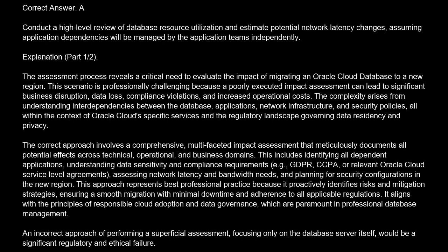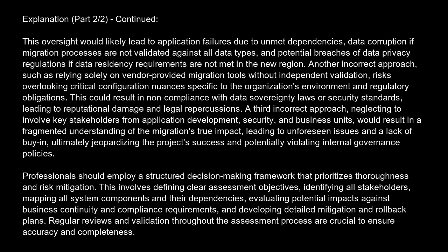An incorrect approach of performing a superficial assessment, focusing only on the database server itself, would be a significant regulatory and ethical failure. This oversight would likely lead to application failures due to unmet dependencies, data corruption if migration processes are not validated against all data types, and potential breaches of data privacy regulations if data residency requirements are not met in the new region.